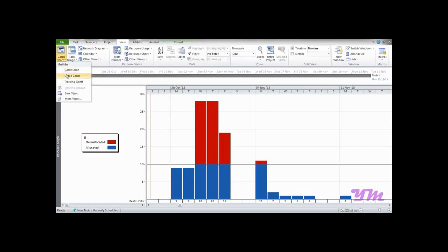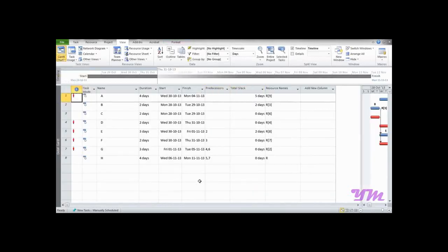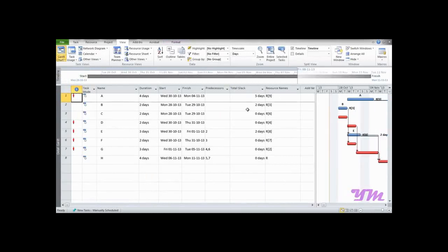So let's get back to the detailed Gantt chart over here. Now you can see that we have slack available for some of these days for A, B and E. So delaying the prior activity would not affect the overall project cycle or project time. So one way to settle this issue is by using the slack. So let's readjust these activities so that some of the work can be carried out on another day, thereby not affecting the entire project cycle.